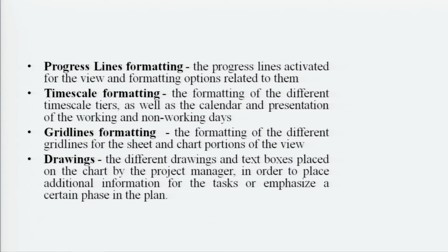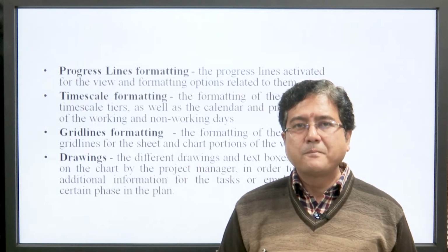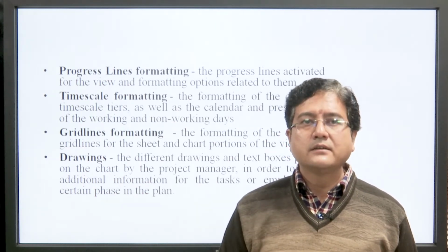Progress line formatting. Time scale: the formatting of the different time scales, as well as the calendar representation of working and non-working days. We must represent which time is a working day, because sometimes there is a holiday. So in advance we reflect on the calendar time scale that this is a holiday, and we do not include it in our planning. If we include our holidays also, then it will delay us already.